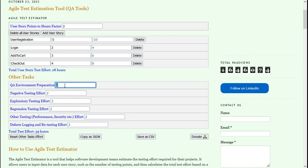For instance, I can say that QA environment preparation is going to take not 1 hour but 2 hours. Then negative testing to test whether the system is handling incorrect or invalid inputs correctly—it is going to take 4 hours.